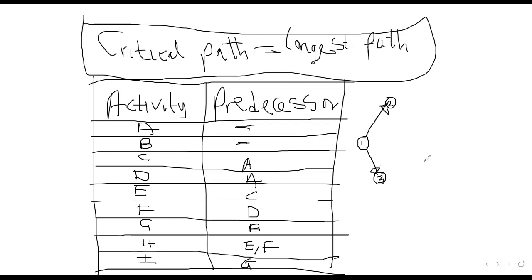Meaning that A and B are starting from 1, because there's nothing preceding A and nothing preceding B. These are the starting activities.